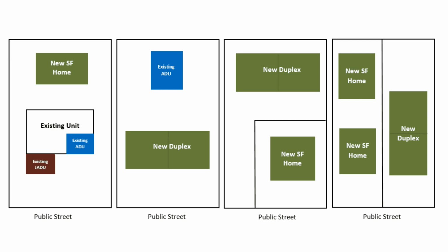Additional information on subdivisions. You will need to hire a licensed surveyor or engineer to prepare a tentative parcel map and illustrate compliance with the Subdivision Map Act and the Milpitas City Code, Chapter 1 Subdivisions. Tentative map submittal requirements. Tentative subdivision map. See the Universal Planning application for submittal details on tentative parcel maps. Note: a maximum of 2 units of any kind, primary dwelling, ADU, or junior ADU, on each of the 2 resulting lots from an urban lot split are allowed. An ADU/junior ADU is not permitted when the lot is split and 2 primary units are developed on each lot.